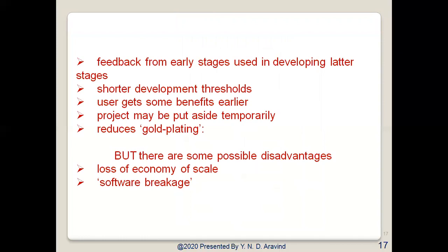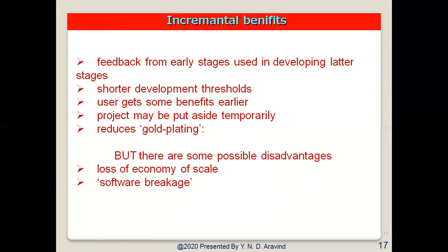Various methods are accepted for combining linear and iterative system developments, with the primary objective of each being to reduce the inherent project risk by breaking the project into smaller segments and by providing more ease of change during the development process.